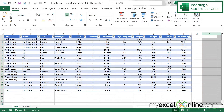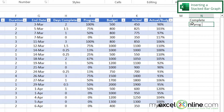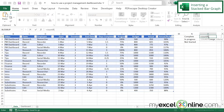Now let's go back to my data. I'm thinking: anything with a progress of zero has not been started, anything with 100 is finished, and anything in between is in progress. Let's create a small summary table with labels: Complete, In Progress, Not Started. Next to Complete I'll type =COUNTIF( then select the progress range, comma, 1, close parenthesis, and hit Enter — I can see two tasks are 100% complete.